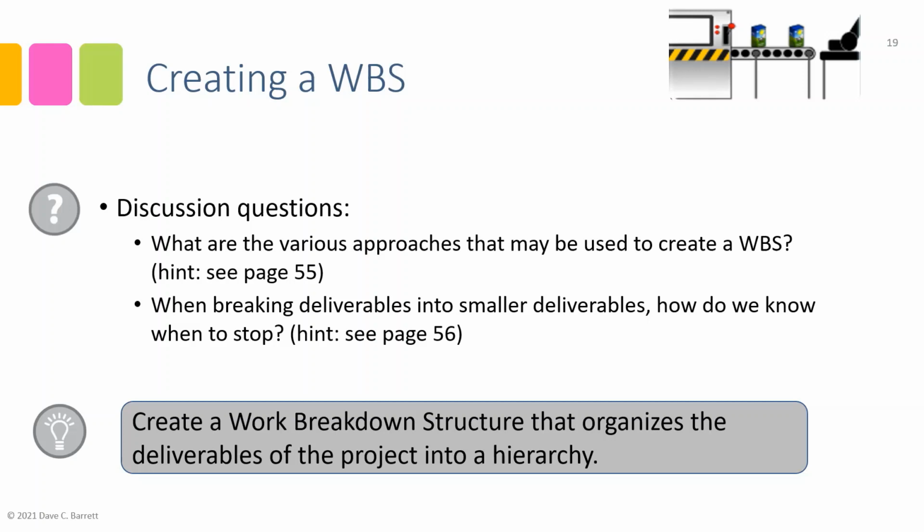So you may say that a certain person or team is responsible for the communications deliverable, and they're responsible for all work packages in that deliverable, as an example. Or you may assign a certain work package to a person or team as well. So it allows the project to be seen as a collection of deliverables, which allows you to manage it more effectively. So the creation of a work breakdown structure is a key step in the planning process, and it should be done very carefully and thoughtfully.